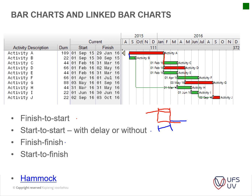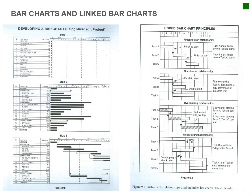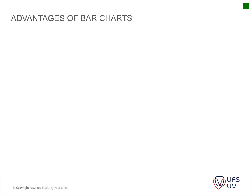Finish-to-finish means when one item is finished, the other should be finished as well. Start-to-finish means when one starts, the other should be finished. The most important thing from this chapter for you is developing your bar chart: first list your items, then schedule the time periods, and then link them accordingly. Those are the main steps you go through when doing your scheduling.